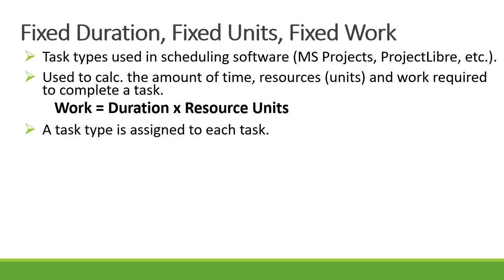Fixed duration, fixed units, and fixed work are task types used in scheduling software like Microsoft Project, Project Libre, and other software. They are used to calculate the amount of time, the resource units, and work required to complete a task. The formula used in the software is: work equals duration times resource units. A task type is assigned to each task in your project schedule.